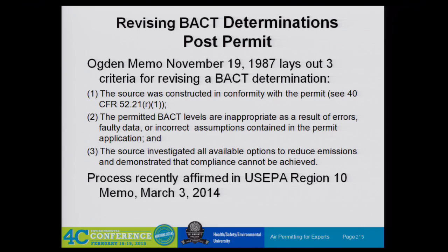We had one of those issues. Vendor promised they could do this, they couldn't do this. They tweaked it, and basically they came back and said, "Okay, we tried, sorry." I went through all the contracts, and they were going to do this emission rate at this fuel gas, these certain conditions. So we mimicked their conditions as best we could, and that was difficult enough to get the fuel gas. It still didn't meet,